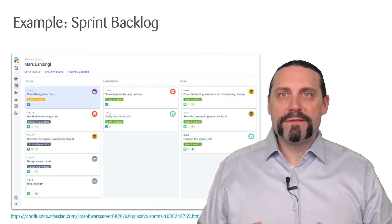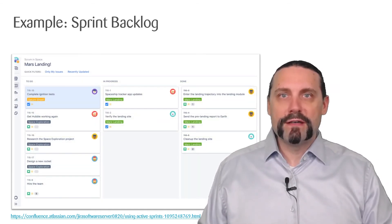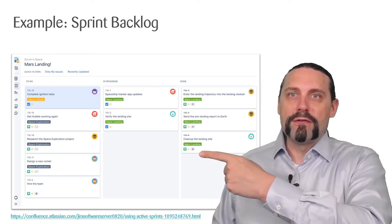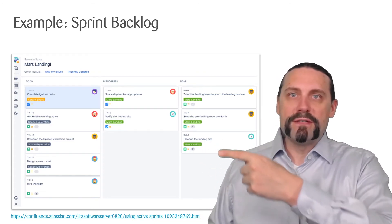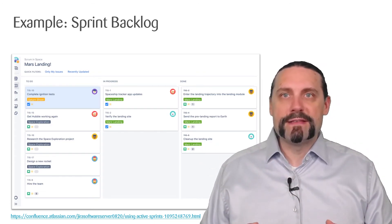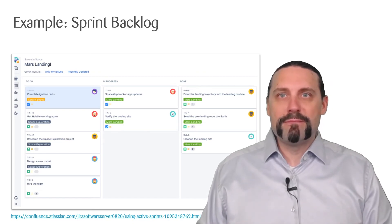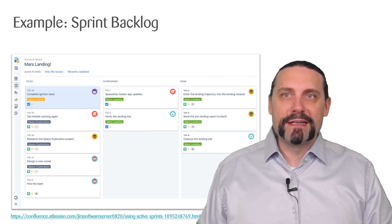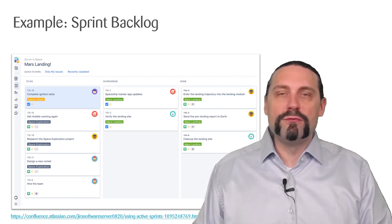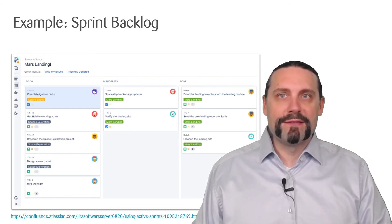Here you can also see the button to start a new sprint. When you have started a new sprint in Jira, you are on the sprint backlog view. This is the most simple sprint backlog we can have — it has the columns for to-do, in progress, and done.